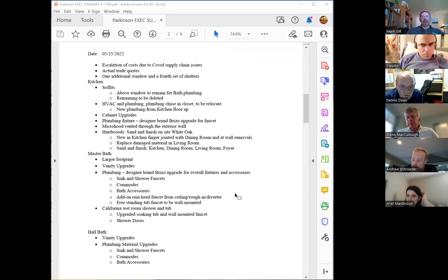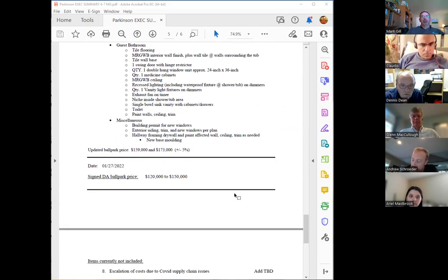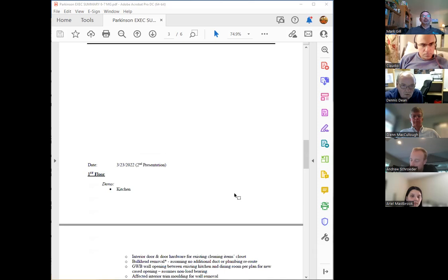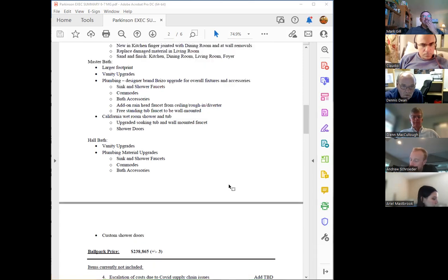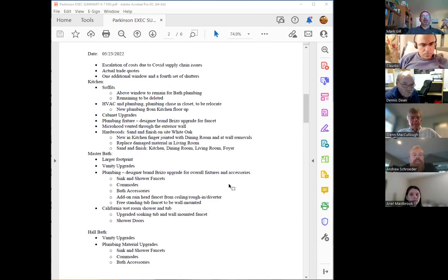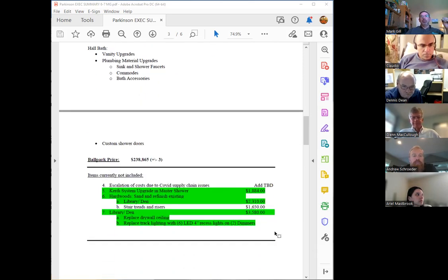So it's real easy from an estimator standpoint, a sales standpoint, and a client standpoint to see how we got from 120 to 150, which is what he signed his design agreement for, to $238,000. Because line item by line item, this added, and this added, and this added, and it was very clear to him and to us what the added scopes were. It was very clear to him what his optional decision points were, so he could make those optional decision points.